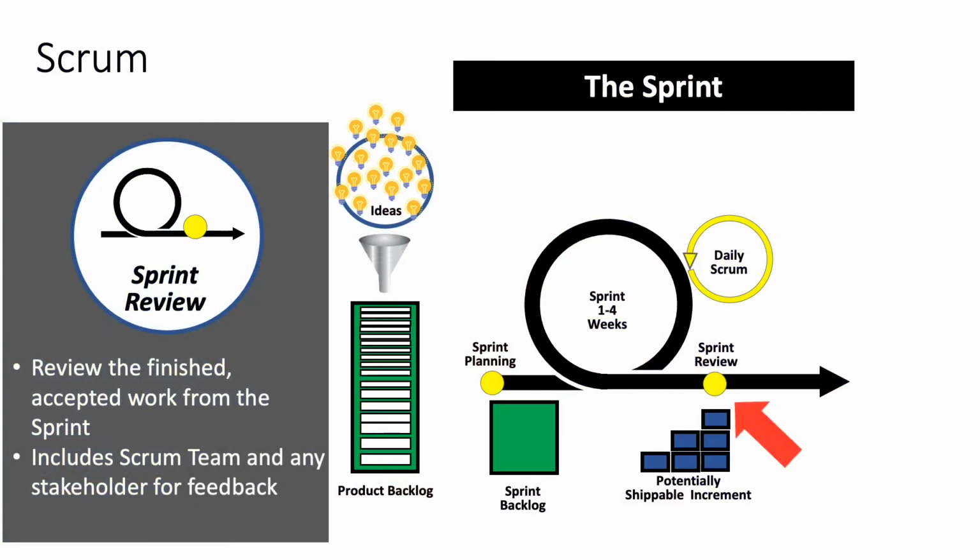Can the work be moved to production or used immediately? That depends on the product owner. The product owner makes the decision based on a number of factors. A working principle here is build on cadence, deliver on demand. So build in sprints, and when there's sufficient value that's been created that can benefit the customer, then deploy that finished work to the customer as quickly as possible.